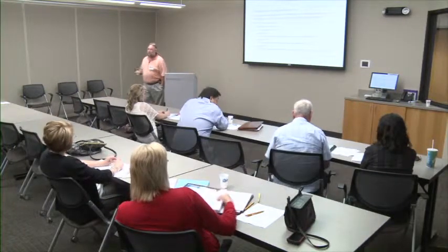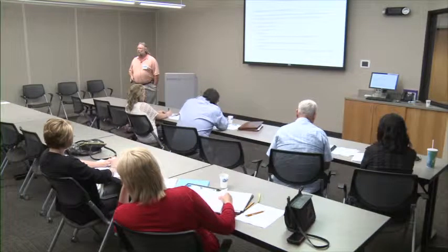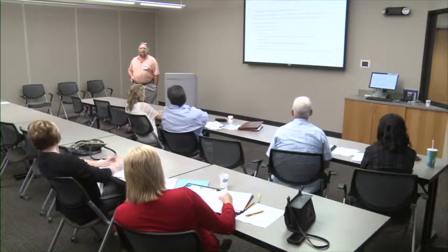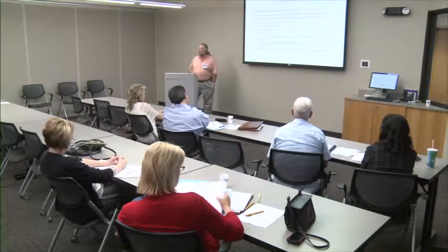So I would suspect that ODOT has a lot of dispute resolution that it has to deal with. He was talking about change orders, six a day, that the new person's going to have to deal with. Each one of those change orders is based on probably some sort of dispute resolution. Maybe. But so you've got the simple concept, mutual agreement, a change order. We decided that there was more dirt there than I thought, or there was less dirt there than I thought, and it was a significant amount that I need more money or less money and need to give you money back. So we're going to issue a change order.